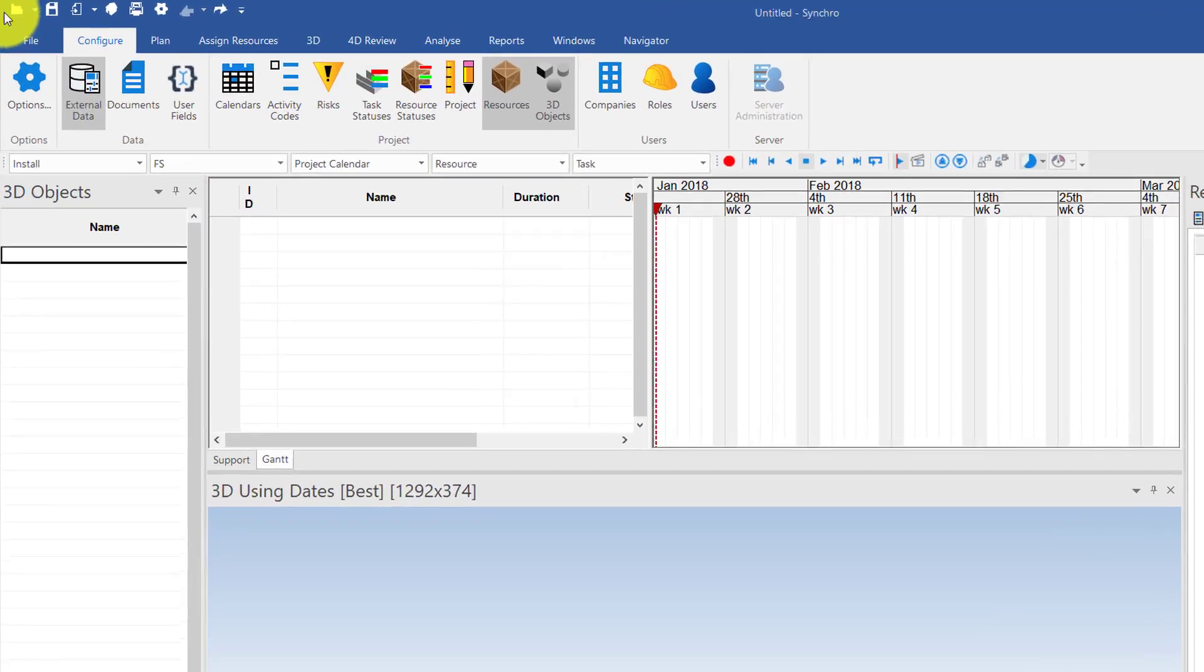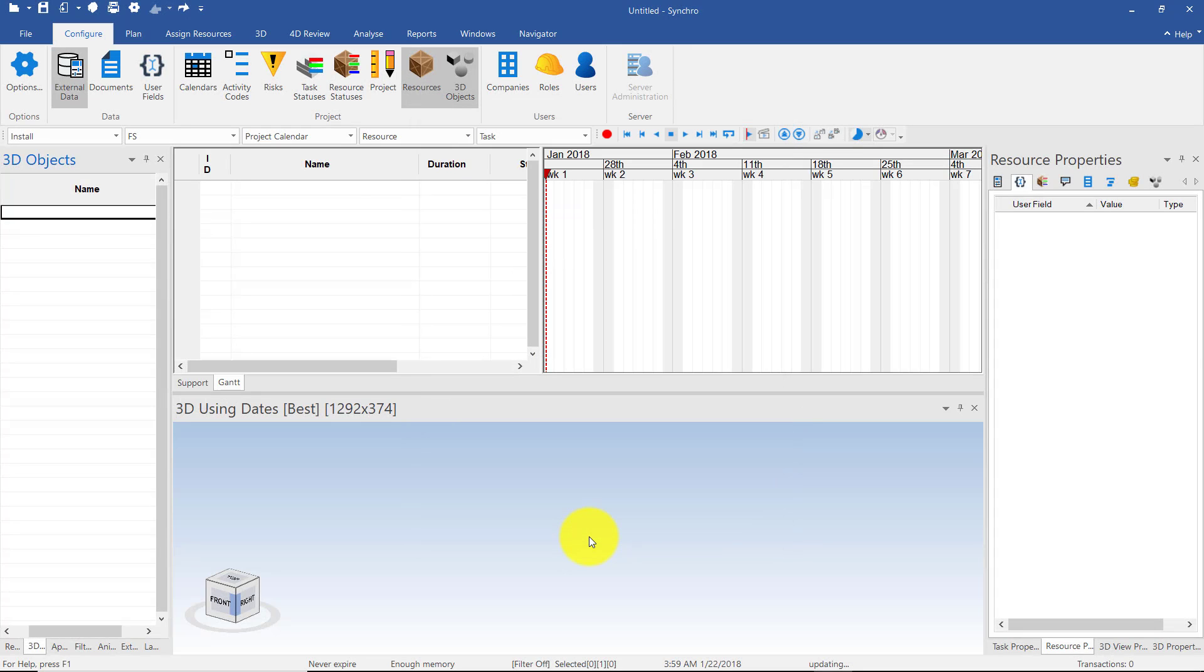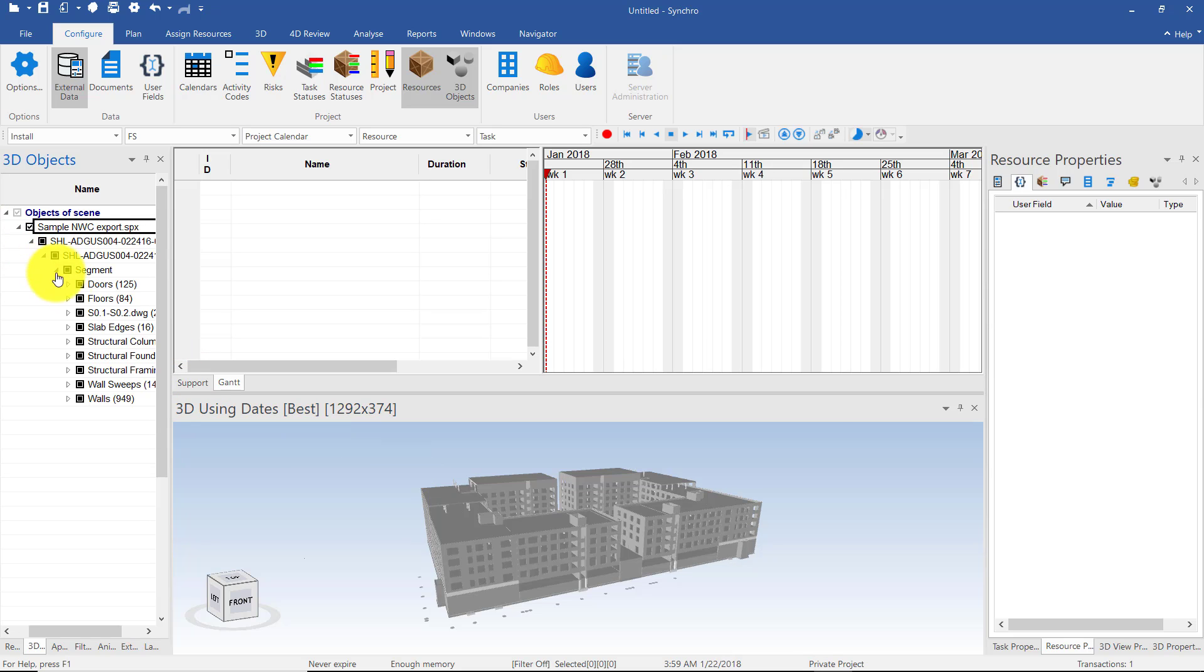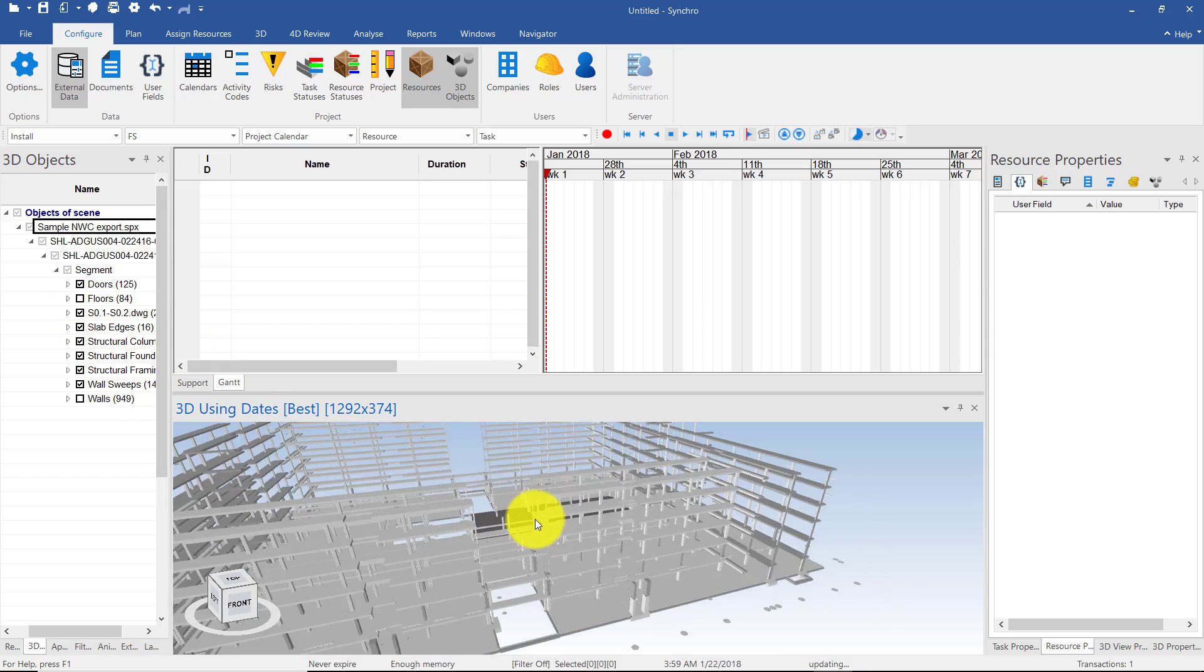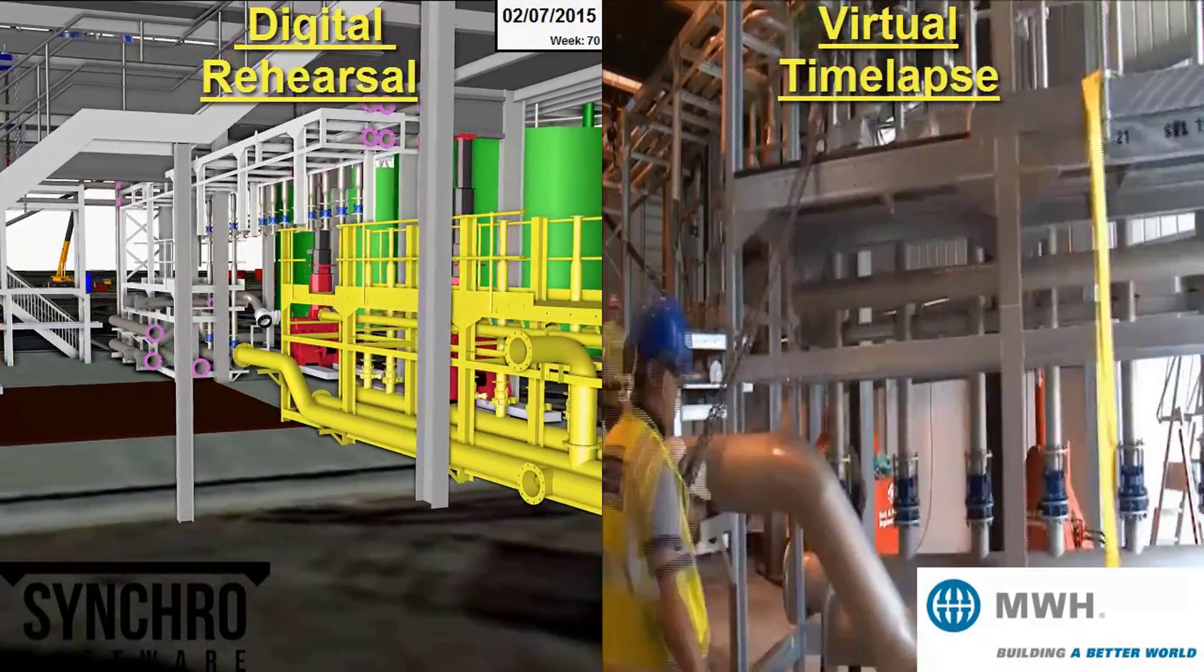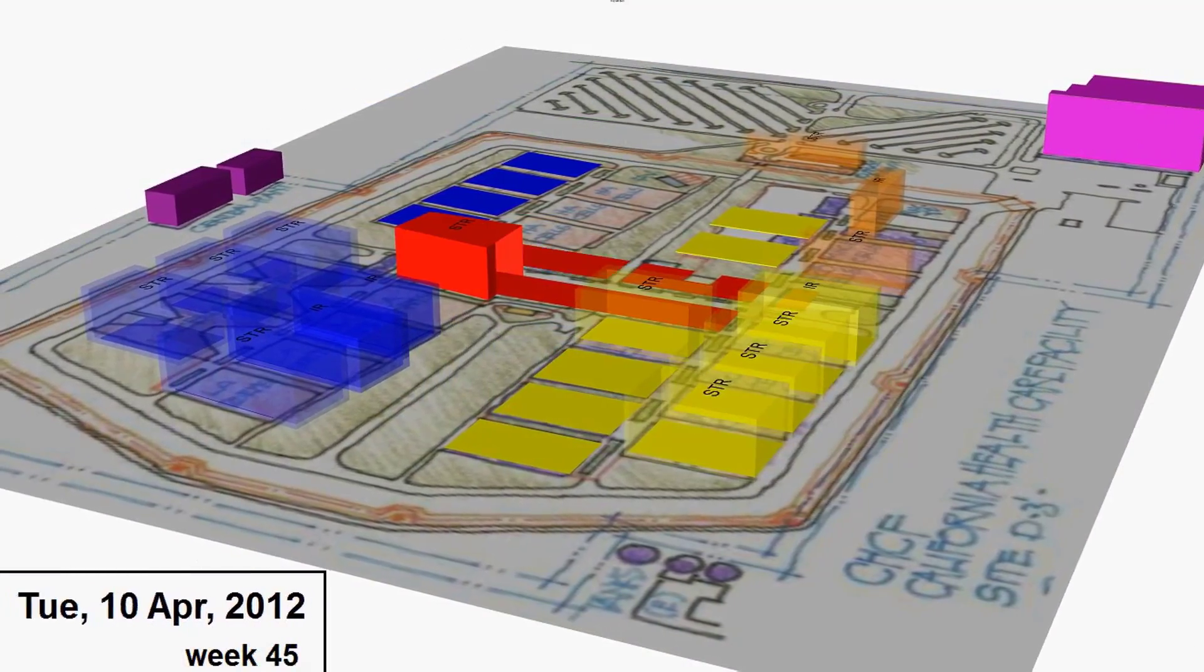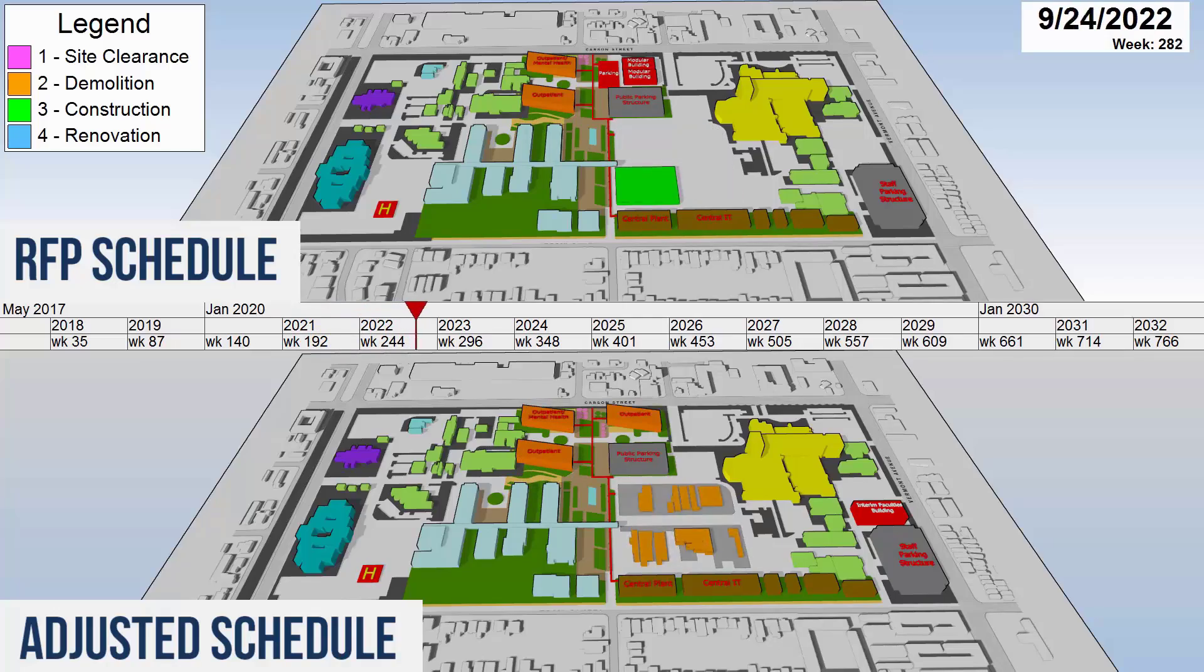You usually start by importing the 3D BIM models that you have. Depending on your 4D objectives and where you are in your project lifecycle, these may be your design BIM models coming from Revit, Navisworks, MicroStation, ArchiCAD, or practically any other BIM package. They can also be highly detailed laser scans converted to mesh for projects where spatial accuracy is very important, or even just a PDF drawing with some extruded shapes for high-level master plans and long-term projects. For example, the construction phase on the project shown here is over 20 years long.